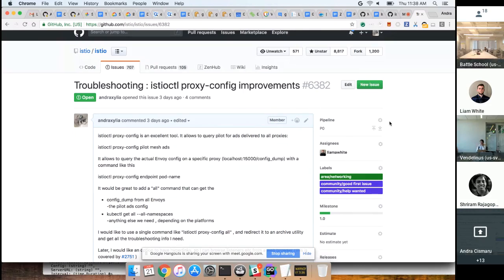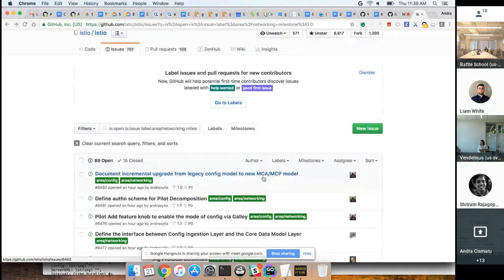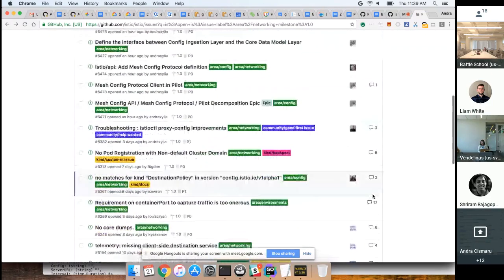We also don't want to spend an inordinate amount of time on a particular issue because we have 89 of them. But the point worth making in general is that if you look at the distribution of bugs, a very, very small percentage of them should be P0s, because otherwise it doesn't represent any realistic prioritization. Yeah, I agree. We have 89 overall, and I suspect we're more likely in the range of 10 to 20 actual P0s.